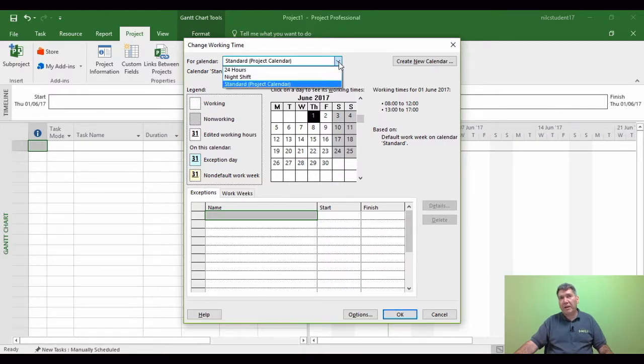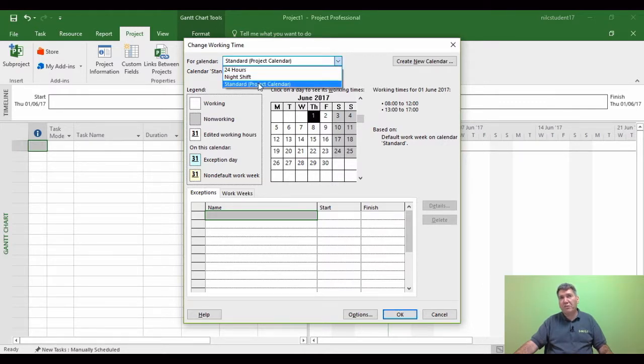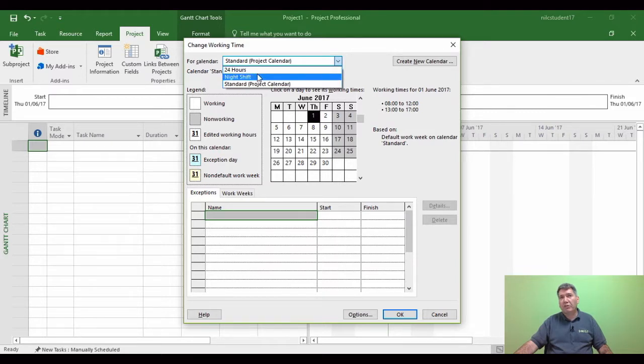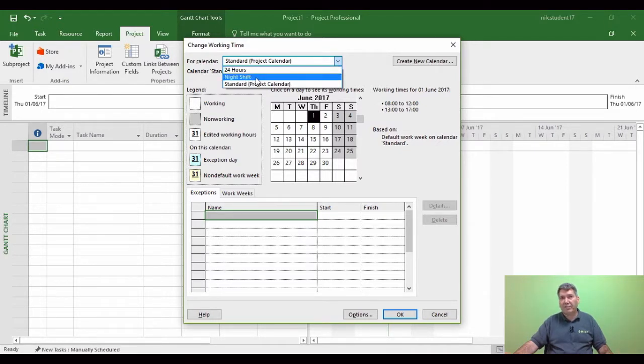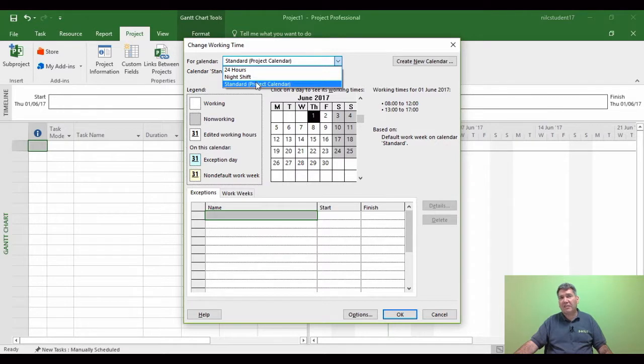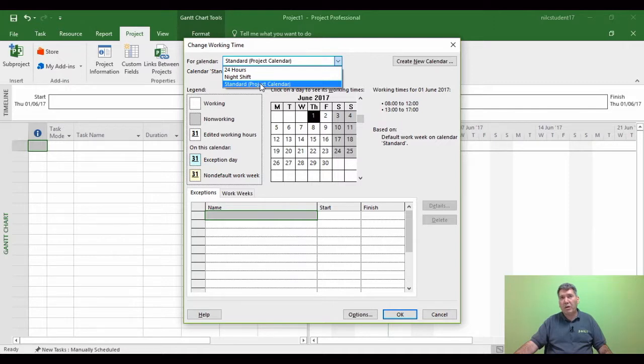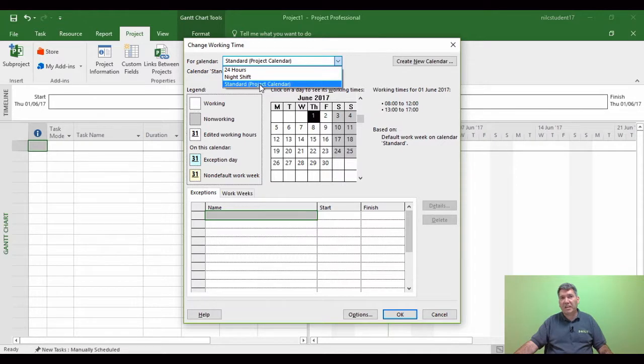Well the standard calendar is what runs Microsoft Project. Now if I click the drop down arrow, there's another two calendars which Microsoft has by default. So it's the 24-hour calendar for companies who work around the clock, there's a night shift calendar that has different timings, and the standard calendar. We're going to keep it on the standard calendar for Microsoft Project, and we're going to affect the timings of the standard calendar.